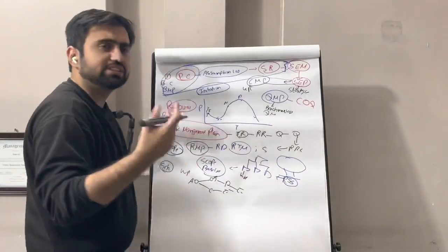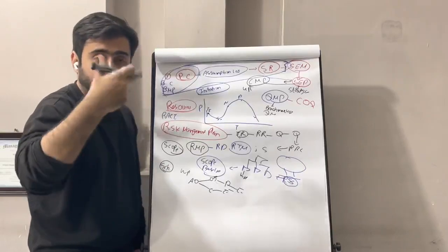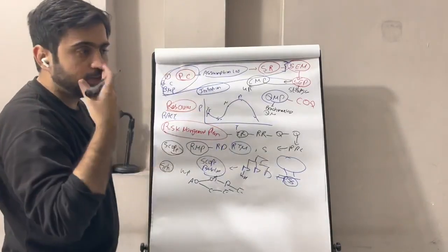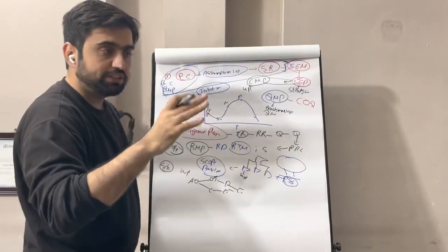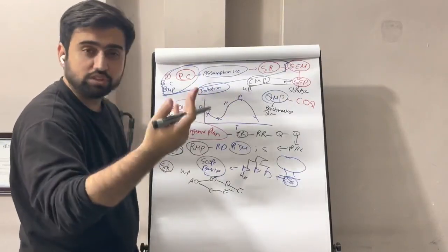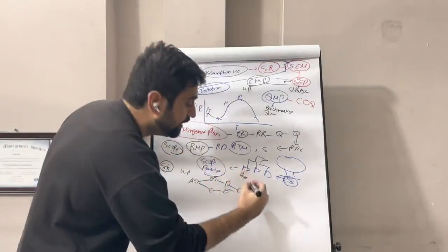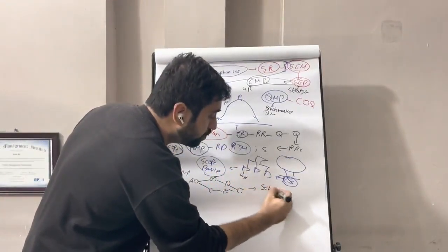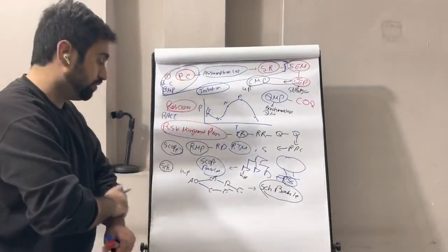We calculate the duration through analogous estimation, parametric, three-point, bottom-up estimation. We form the critical path method, and we calculate the durations of each activity. We add that, we get our schedule baseline, project schedule, schedule data, things like that. And schedule baseline is the output here, basically the main thing in the planning area of this one.